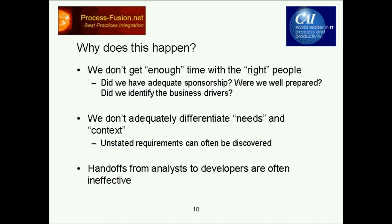And we also probably recognize that very frequently, as we go through a project, we are getting behind and maybe we're over budget. And so one of the things that frequently happens, more often than not, is that we begin to drop some of the requirements. We de-scope the project in order to get it done somewhere close to the original budget and the original schedule.